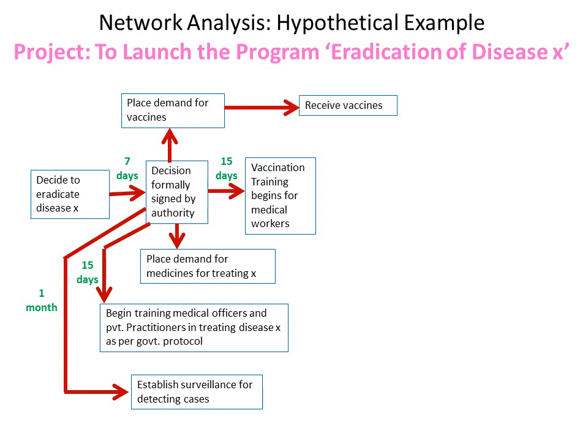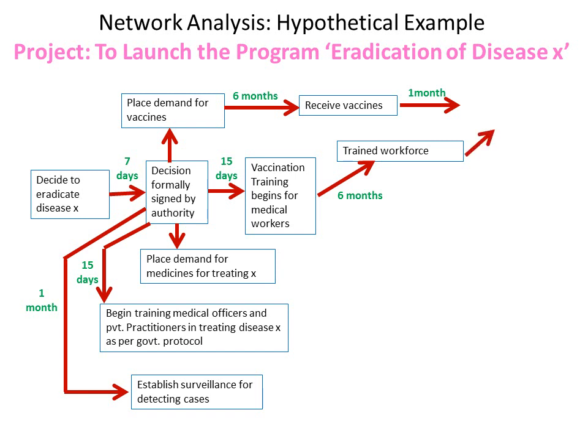Now, the vaccines would be received approximately within 6 months of the demands, and the training for medical workers would take 6 months. So simultaneously they will get completed, and within 1 month of receiving vaccines and within a few days, the vaccination can begin in some districts.